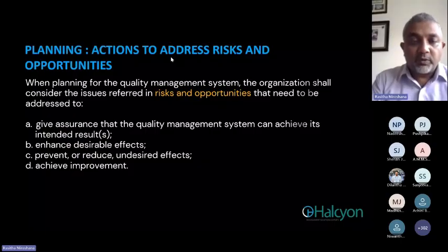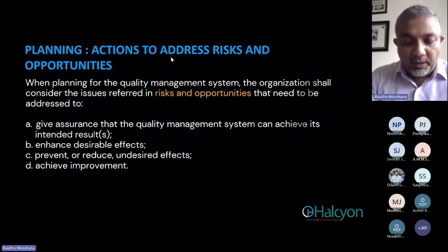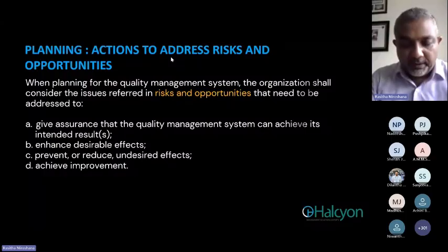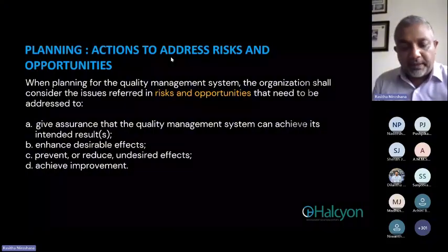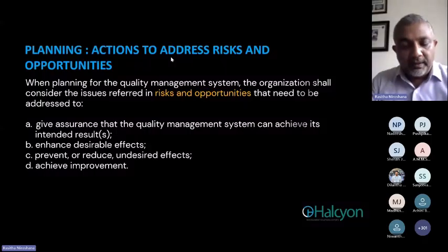Superb. Sanjay, this is superb. Only thing you can do is, you have identified all the tasks, and then maybe different tasks have different responsibility. Like your EHS team cannot take all the tasks, like covering PPEs usage. So purchasing PPEs will be done by different people, right? And then emergency response, you might need to work with the fire team. So try to identify the task. Task is already there. Identify the responsibilities. Then the timeline is almost perfect.